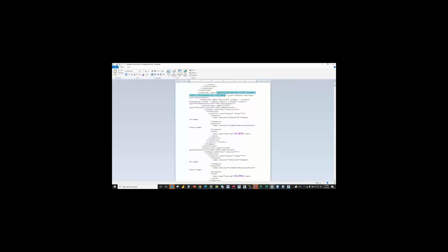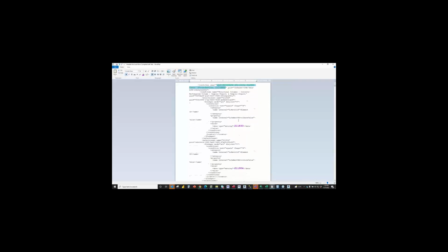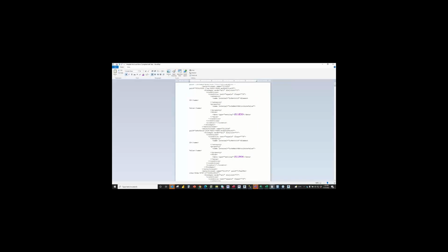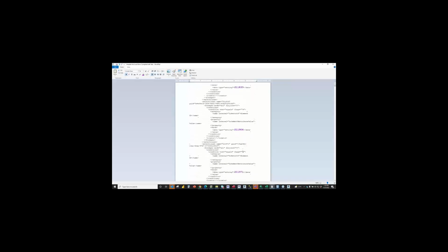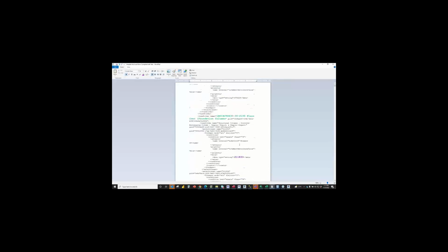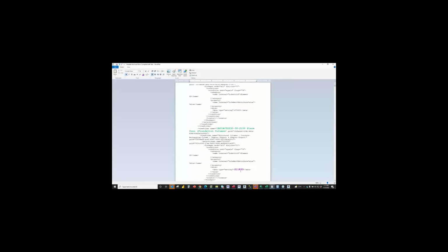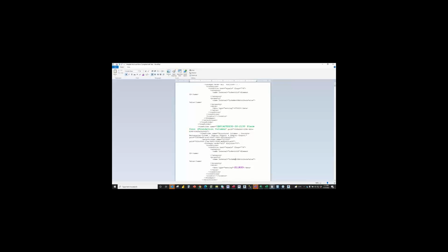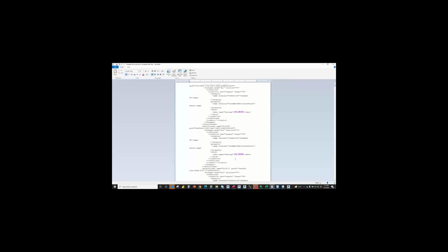So this selection set is going to bundle up these instance IDs within the model. Okay. And Rich, how did you generate this portion? I again extracted the tasks and their instances, and I had to run this through a script that generates the XML syntax.